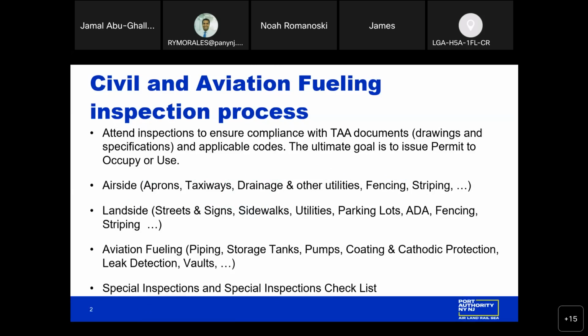Thank you. So the quality assurance division for inspections is an offset of the certification that we get from the engineer of record. Once the REO receives it, and the documents are in conformance, the REO confirms that the area is ready for a QA audit. We go ahead and schedule that on the calendar. Someone from Jamal's group or fire protection group or our elevator escalator group will be in attendance. And again, this is an outline from that perspective.